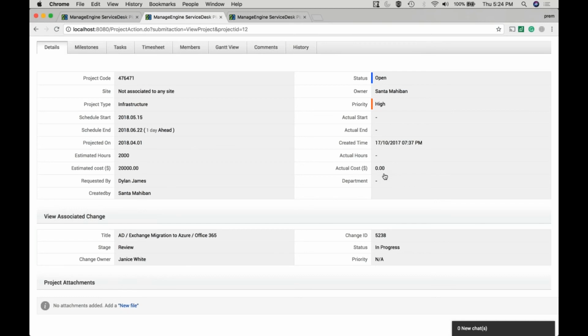So you can compare the actuals and estimates and find out the deviation. This deviation data will help you to better plan your upcoming projects. So the experience that you gather from executing a project, even if it is a failure, you have to record it so that that experience will help you to better plan the upcoming projects. So in all layers, you've got actuals and estimates.